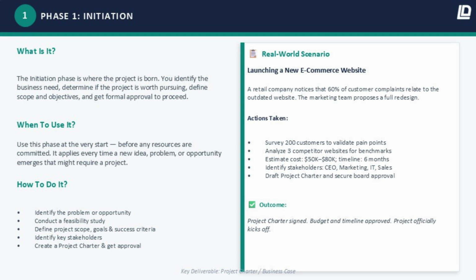When do you use initiation? You use it every single time a new idea or opportunity surfaces. Every time. Before a single task is assigned, before a single dollar is spent, you go through initiation. It doesn't have to be a lengthy process. For a simple project, initiation might be a 1-hour meeting. For a complex enterprise project, it might take weeks. But it always happens.